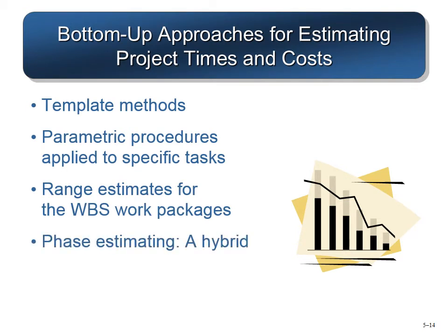In the bottom-up approach, we can use the template method, which is based on past experience. So you develop a template, like for making a brickwork, these many workers are required, or this much material is required. So you have those known facts from the previous experience, and you are using those to do the estimation.